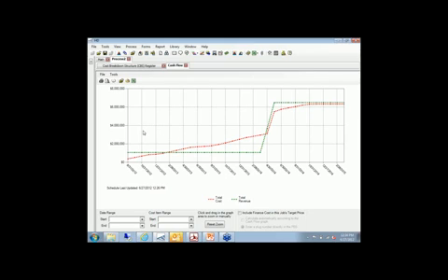And then the green line, the revenue, is based on a typical scenario where there are milestones that drive our revenue. Right? There's payment schedules, so we get a payment up front. Maybe there's another payment tied to an activity, and that activity is not happening until way over here. Right? So we don't get our next payment until it looks like about 6 months. And then it looks like we get a big chunk of revenue coming in very quickly, and then it levels off as we finish out the work. So the schedule, we can tie cost and revenue to various bars on the schedule, and as that schedule moves around, these lines are going to update.